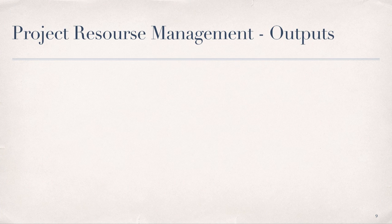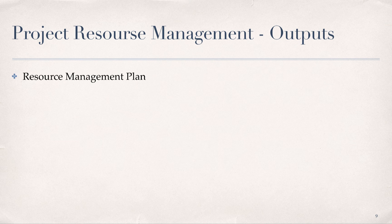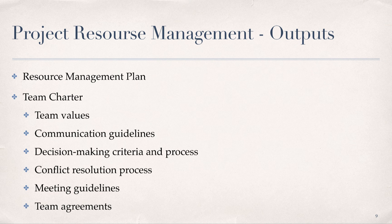According to the PMBOK, there are two project deliverables or outputs associated with the project resource management plan processes. These include the resource management plan and the team charter, which outlines the team values, communication guidelines, decision-making criteria and process, conflict resolution process, meeting guidelines, and team agreements.